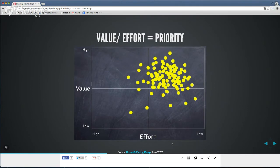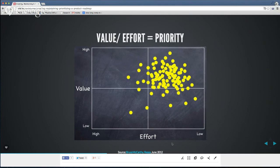As far as effort — it depends on your skill set and knowledge. Sometimes, if you're more technical, you can estimate the effort yourself. There are different ways to estimate effort — if it's agile, you go by story points. In my case, since it's a complex product with many devs involved, in order to estimate effort I'd need to get the front-end and back-end lead devs in the room and put some rough estimates on things before I can prioritize.